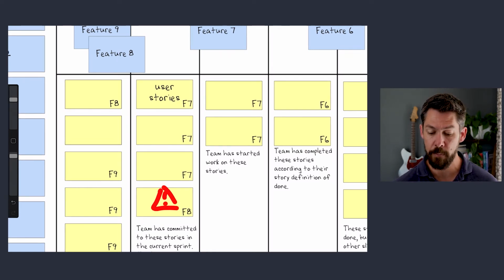For example, a team might pull an item into the sprint that's lower priority and say something like, we need to go get some questions answered on this one, and we can't start it until you do, but it's probably going to be 6 or 7 days till we get to it in our 2-week sprint. So we're going to pull that in, but put an impediment on it. And as long as you can get that resolved by the time we get there, that one will fit in the sprint. So that's about the only thing I see product owners actively doing in here.